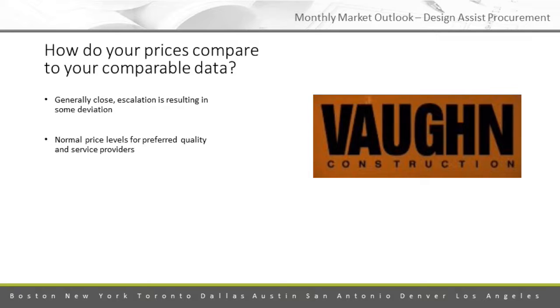But I would say, Blair, prior to the pricing craziness we've been experiencing lately, it's very nice having the ability to check the sub community's numbers against ours when they propose on these jobs, and they generally line up pretty well. Particularly in a volatile market, this will help you control cost, in my opinion. You kind of have that immediate feedback from, I think talking with a mechanical subcontractor, they pre-purchase their coils, right? So you can work with the sub and say, okay, if we can lock this in, we can go and buy X million pounds of steel for our projects, and you can have this price, or vice versa, right?